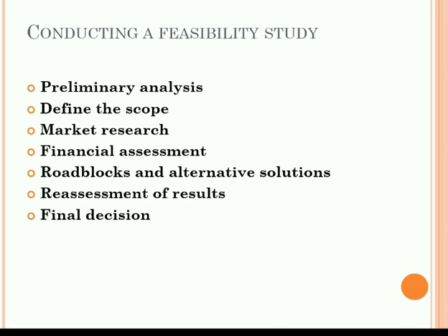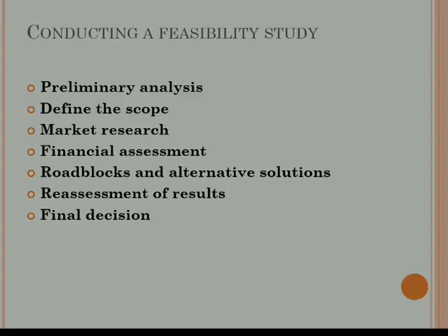Apart from the approaches to the feasibility study, some projects require new constraints to be analyzed. There are internal project constraints we have to consider: technical, the technology we are using, the budget and resources. Internal corporate constraints that we have to consider are financial, marketing and export, etc. And external constraints are logistics, environment, laws and regulations.